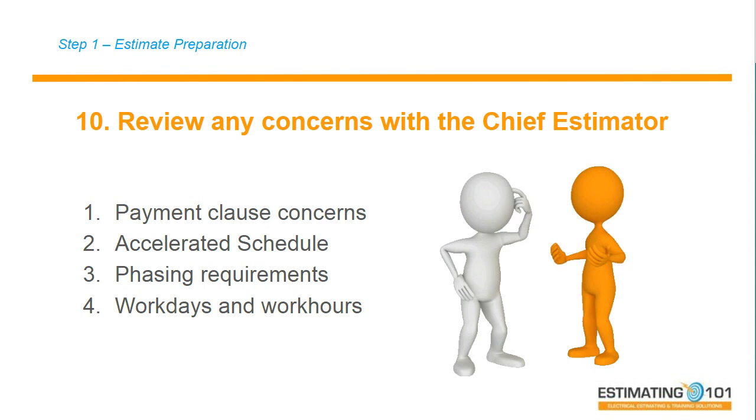We're going to need 30 electricians to get all of this work done. Well, there may not be 30 electricians available to man that job. May not have the foreman to handle that project. So it's vital, I believe it's very vital, that the estimator, before he begins quantifying and counting and measuring, review this and have a chat with the chief estimator.